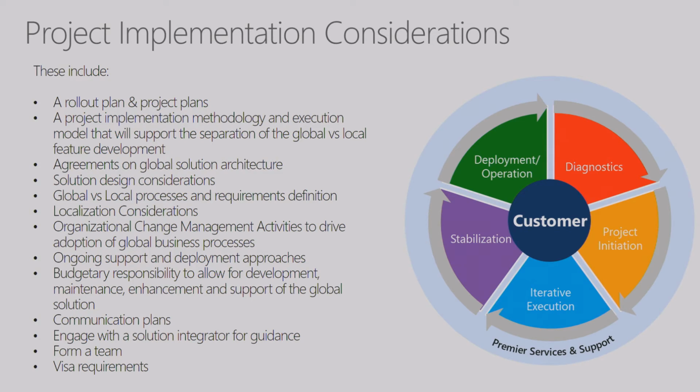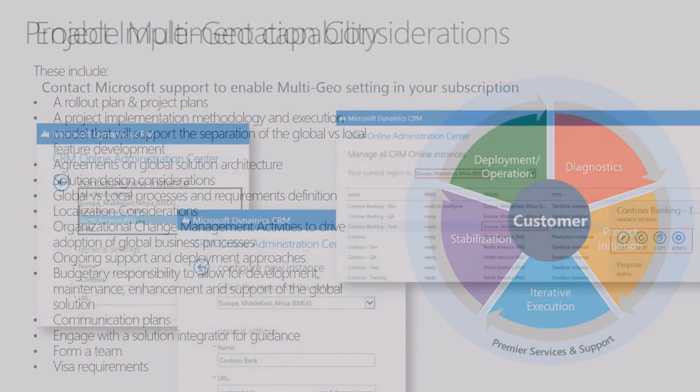So if I'm going to have a team from India, they try to go to Hong Kong, they can only work in Hong Kong for 14 days. It takes 3 months for them to actually get a visa, right? So for my project, at the end of the day, I have to ship myself to India to actually work with the India team, even though the business is actually in Hong Kong. So just watch out when you think about doing this type of global project. These are the things that hopefully you can think about.